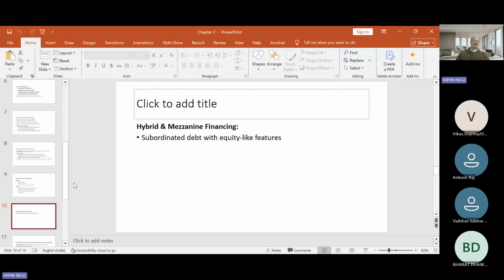You also have a model here which is very specific to India, related to national highway construction. For that, the government developed this securitization model by the National Highway Authority of India, called NHAI, to address the market risk of toll collections. To allow flexibility in refinancing loans for NHAI, securitization or additional lending of up to 30% of the cost of the original project was allowed. What was the idea? The idea was to infuse more liquidity into the sector.